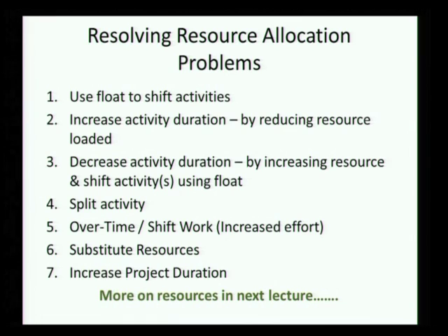You say, I am not going to use a truck, I am going to use people to shift what I am going to do. I have workers, I do not have trucks, it is going to be slower, but it is going to work for me. A kind of real thing. And finally, if you have no option, you increase project duration and justify why the project duration is increased in this context. We need to cover more on this topic.